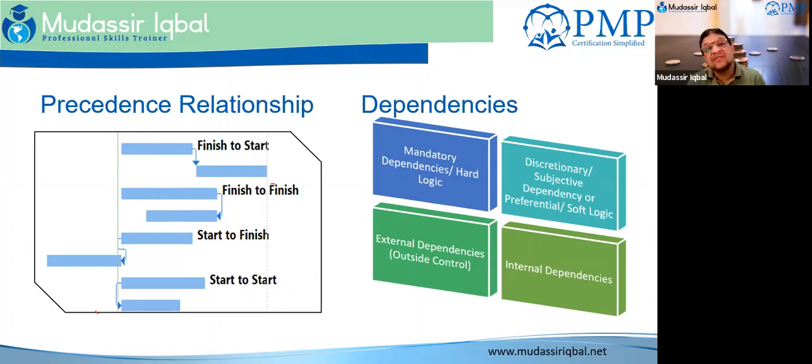Two activities can have two logical relationships at the same time, for example, start to start and finish to finish. Multiple relationships between the tasks are not recommended. So a decision has to be made about what kind of relationship will have the highest impact, and that you should continue with. Closed loops like this are not welcome, and they will not work properly when it comes to changes in the project. So it doesn't work on the logical relationship. Keep it open, keep it one.